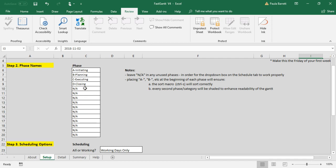One is that the phases are sorted. You'll see that later on. And so by putting them as A, B, C, D, you maintain the sort because otherwise it does it alphabetically, which is what you may not want. The other is that there's formatting that happens that every second phase is shaded in your detailed and summary schedule, which makes readability more important. But again, it's looking for A dash, B dash, C dash, and so on. So those are a couple of good reasons to maintain that.